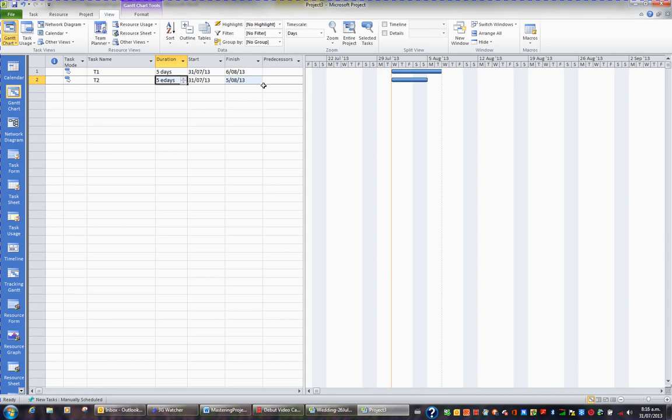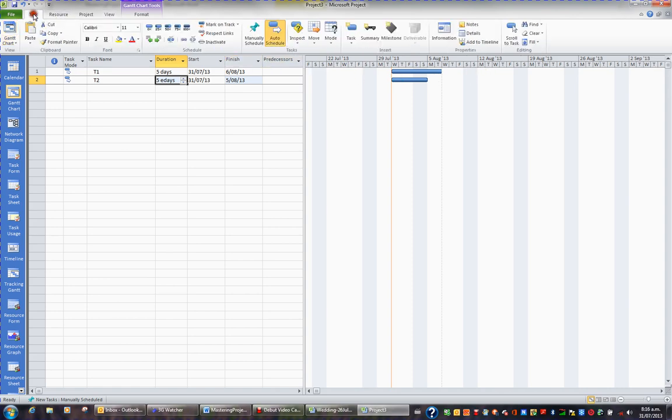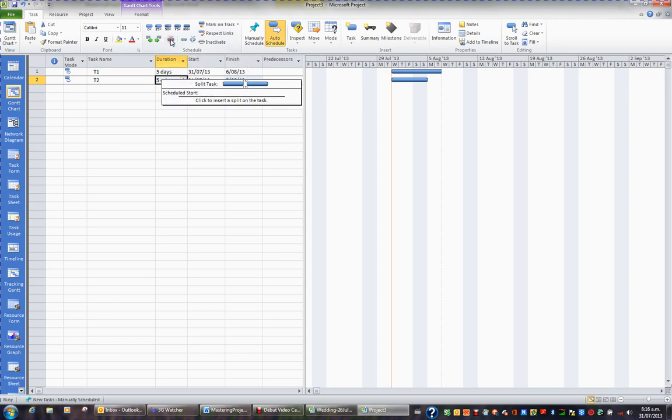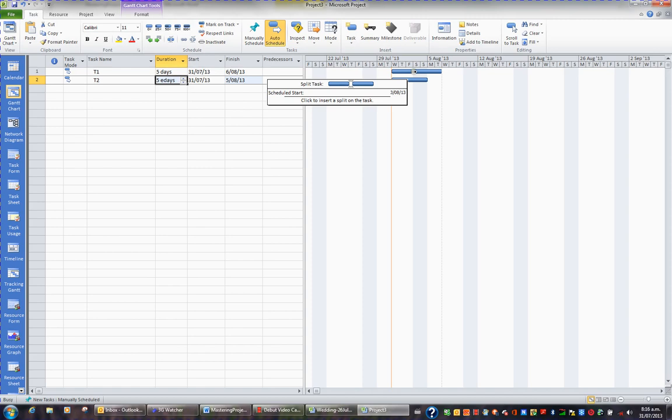Another thing to consider is splitting tasks. Some people like to split a task in half, maybe do three days one week and then do the other two days a couple of weeks later. For this, I'm going to go to the task tab in the ribbon. And what I have here in the schedule group is a button called split task. So I'm going to click that button. Then I move my mouse over to the particular task on the Gantt, and I click where I want to break it. So I'm going to click here.